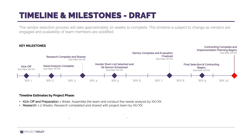From there, maybe one to two weeks to conduct research. You can probably get this done in less than a week if you're fully dedicated to the project, but you likely have a lot of other things on your plate. Give three to four weeks for demos and a deeper evaluation of vendors. You'll likely need more team members involved at this point, and working out schedules across your company and the vendors will tend to spread this time frame out.